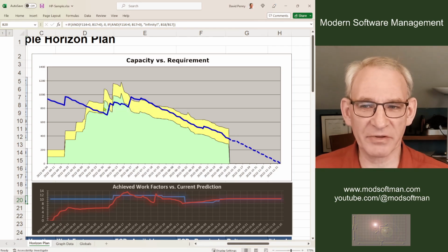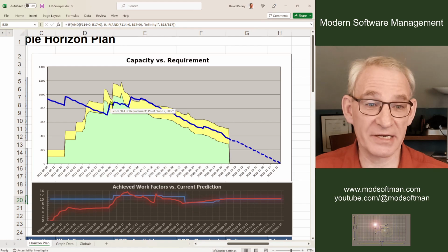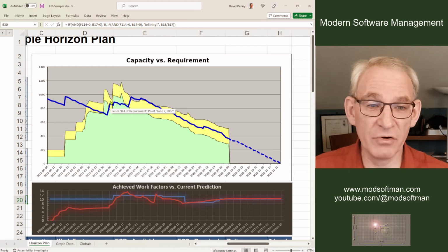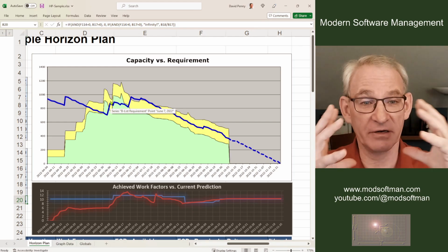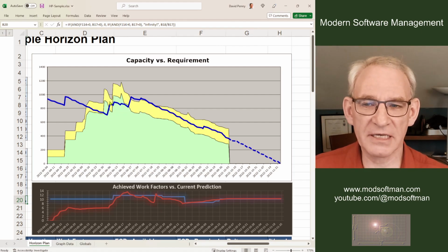So they say, okay. We'll take out some of the features. We'll lower the scope, and we'll also increase the end date. So a rise like that is typical of a change in end date, where because we've moved the date further out, we've increased the capacity, of course. And so now at this point, we've got something that looks okay, decent, not that 70% I want, but close.